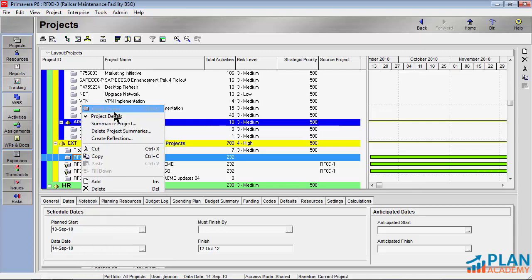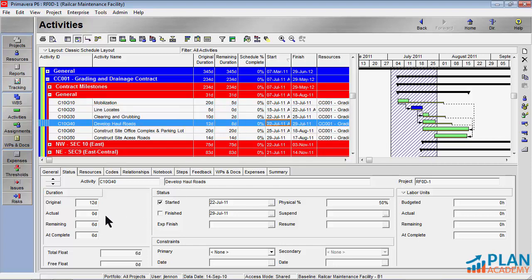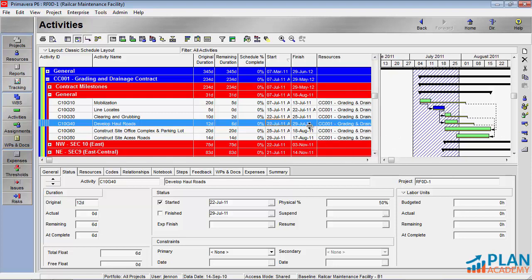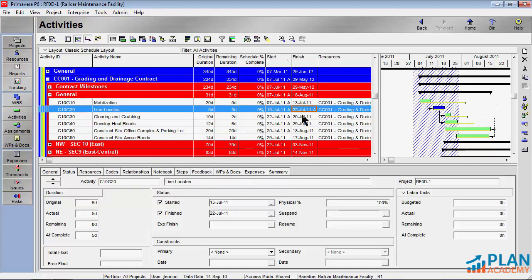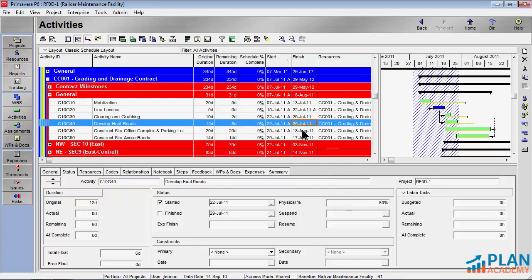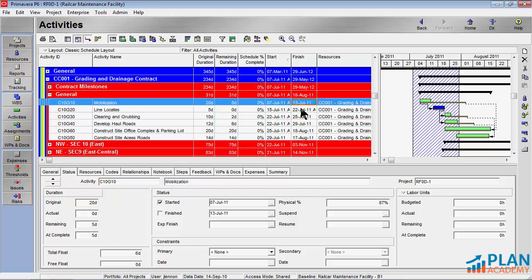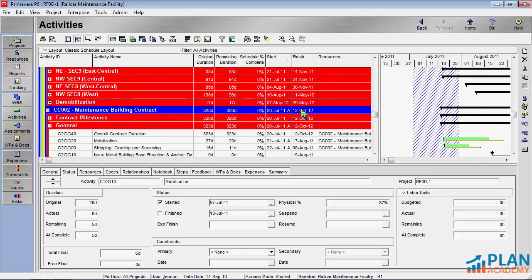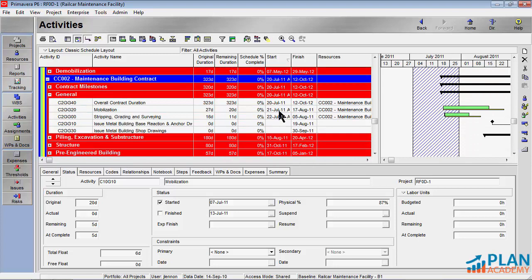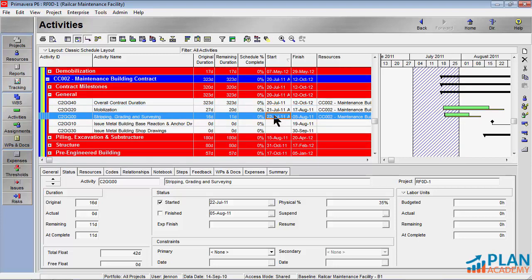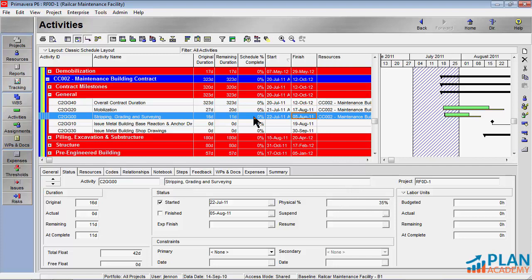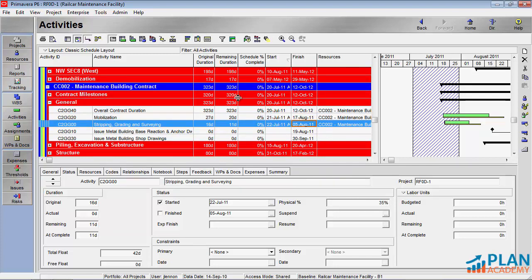Let's go back and have a look at our project. Now you can look at these dates and notice that I have the appropriate actuals set on those dates. So here are my remaining durations. And basically you can see that the information that we logged in there has come across properly. In fact, some information that doesn't show up in the report are the percent complete. So here we logged information about physical percent complete on all of these activities. And although it doesn't show up in the report, it does come across. Why it does not come across, I can't say. I'm not completely sure. My gut would tell me that I'd like to see that stuff in the report. As we go down to the second subcontractor, again, we can see that that information about the physical percent complete has come across as well.